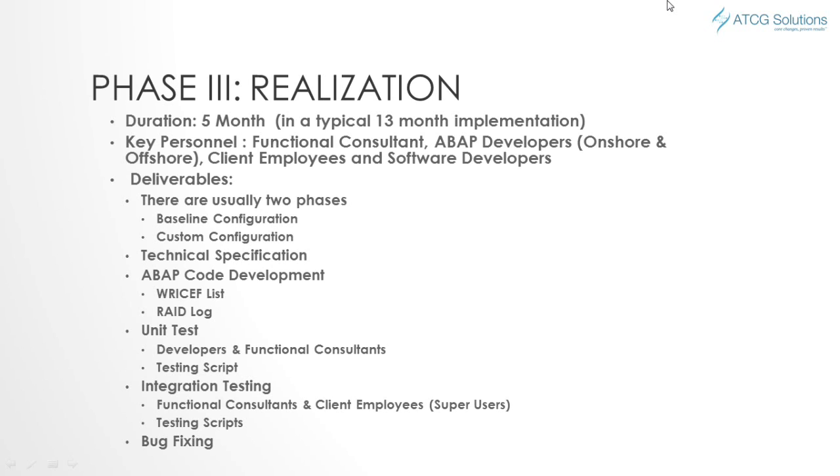Custom configurations are usually identified during the blueprint phase, and an ABAP developer is needed for custom configuration. During this phase, the technical specification will be done. Usually this is handed off to an offshore developer or an ABAP developer to complete their development.